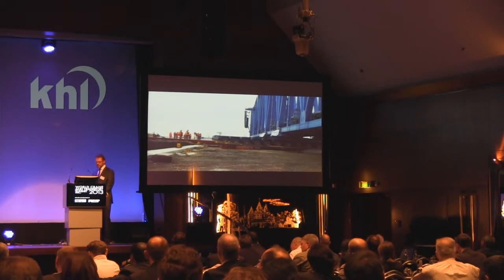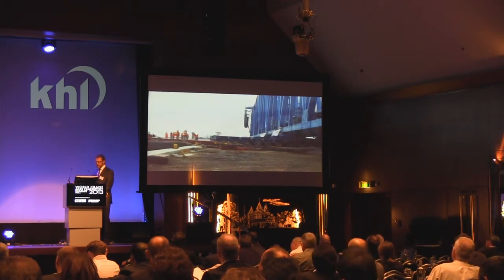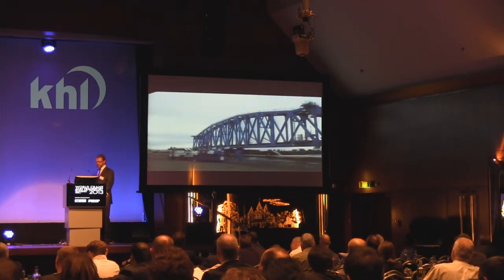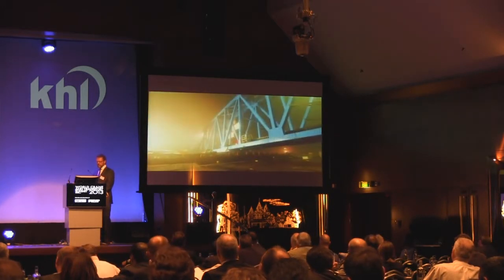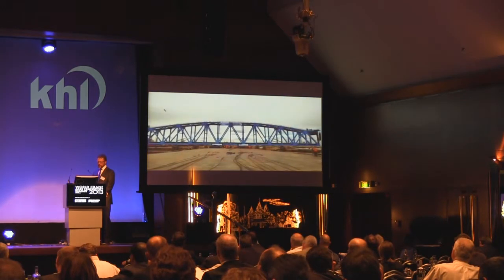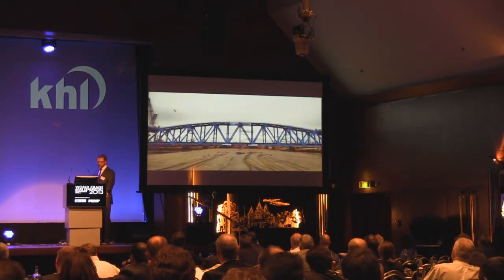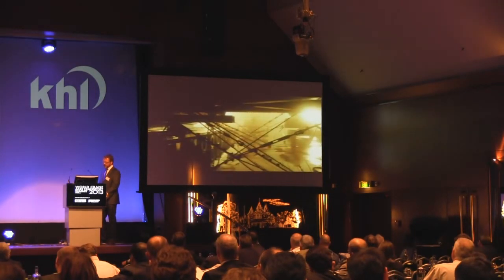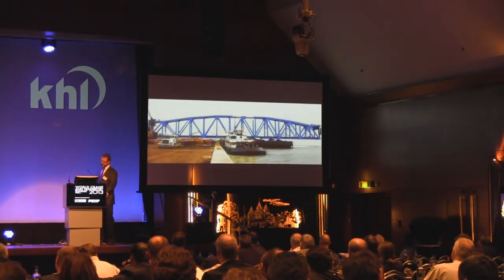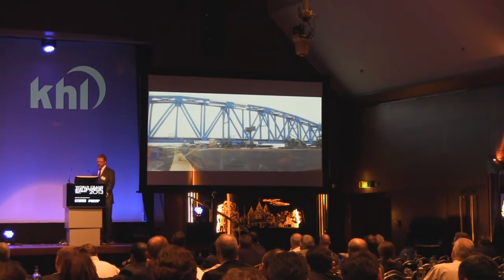Once the transporters were properly positioned onto the barge, 36 tie-downs were installed to secure the barge and transporter for the barge tow to the installation site. Burkhalter staged the barge the evening before the leave in preparation for the early morning crossing. As a safety measure to compensate for the strong winds, the barge was turned in order to better protect the bridge.